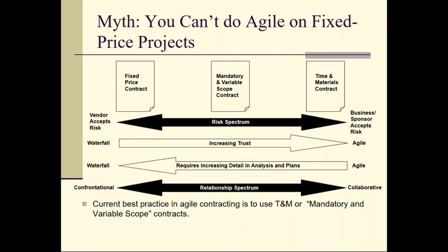So I'm going to say I can do 60 points. No, I've done that. Sorry, I did that wrong. We're going to have 50 points per iteration times 6 iterations. Maybe we're expecting 40 points. I added some contingency to get myself up to 50, and I got 50 points per iteration times 6 iterations. So there's a total of, say, 300 points.